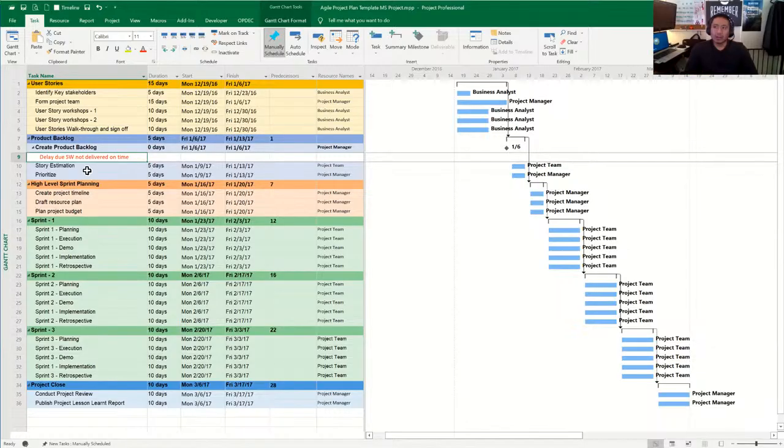And yes and no, because you're opening up dialogue for peak units in some capacity, and you're also trying to encourage either fixed duration or fixed units for that specific task. Also effort driven, if it's effort driven, and does it tie to your scope, or is it an external task? So those are the questions I ask whenever I'm being thrown that question.